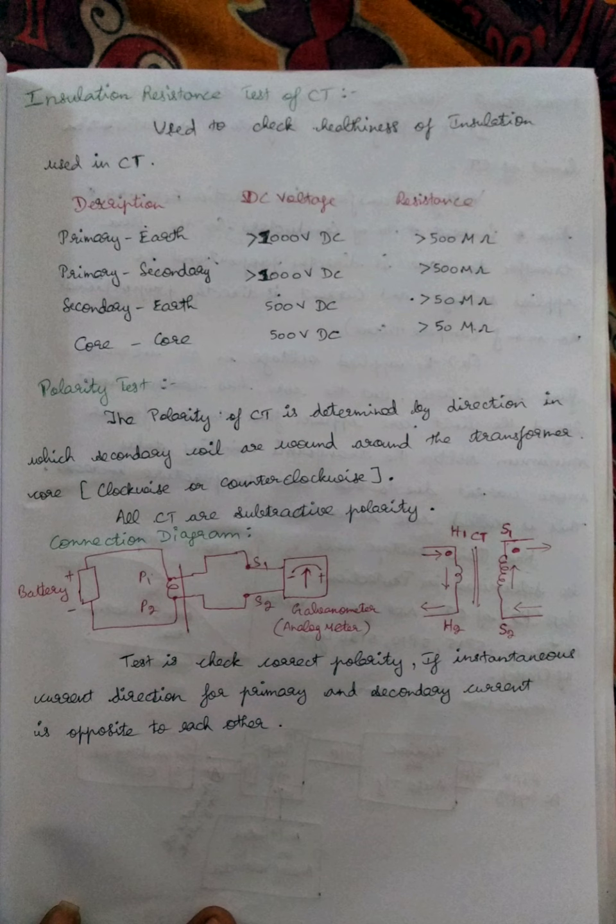Why is polarity testing so important? Because if the CTs have reversed polarity and are connected to the relays, the relay will act automatically, which means the protection will operate due to this polarity malfunction. So polarity testing is important.